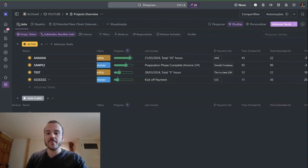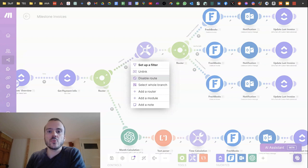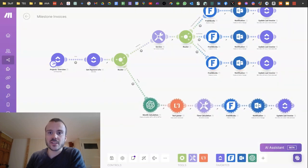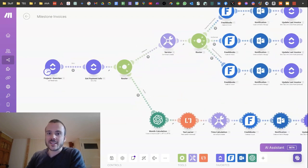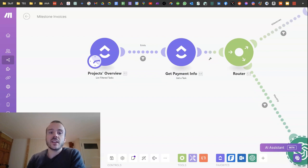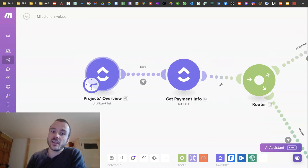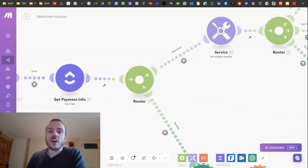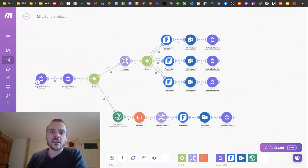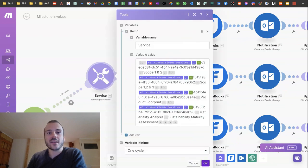Every project is attached to a client on the client payments info list. In the automation, it's divided into two branches: the top branch is for milestone projects and the bottom branch is for hourly-based projects. This automation runs at the end of every month. It pulls data from the projects overview and the client payment info attached to every single project, then we have a router — basically a roundabout — where milestone projects go up and monthly projects go down.